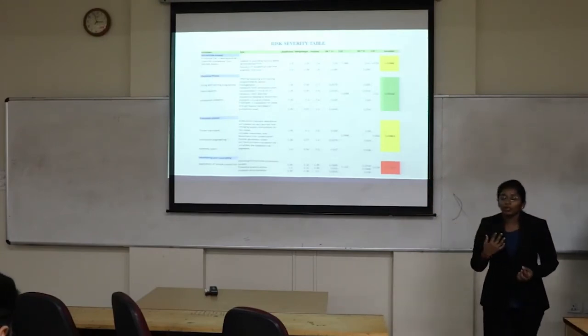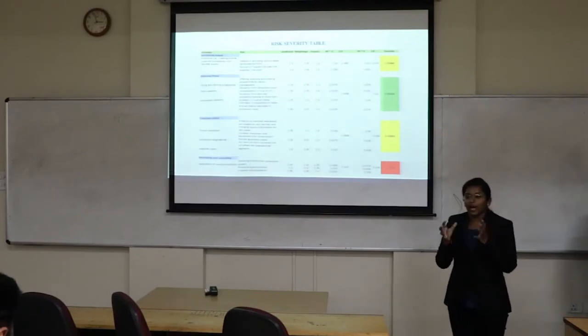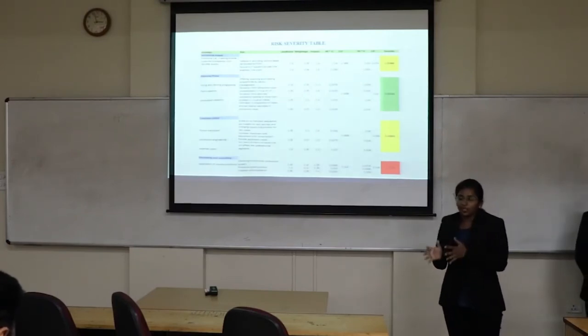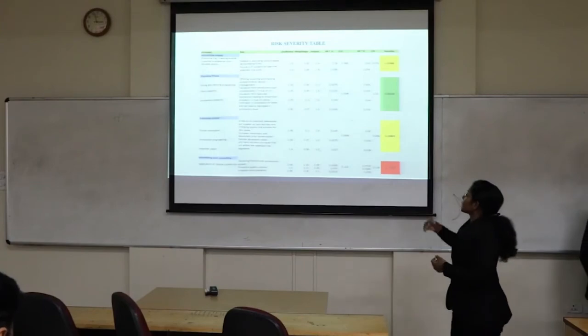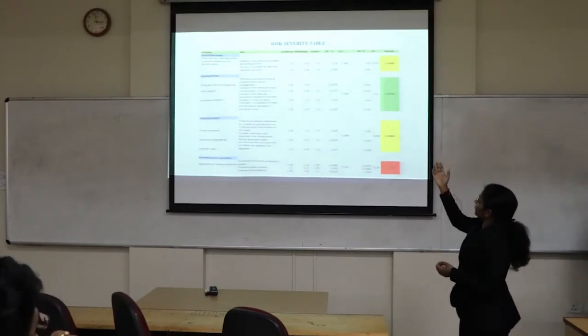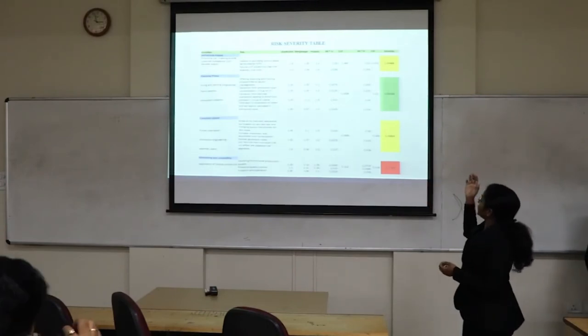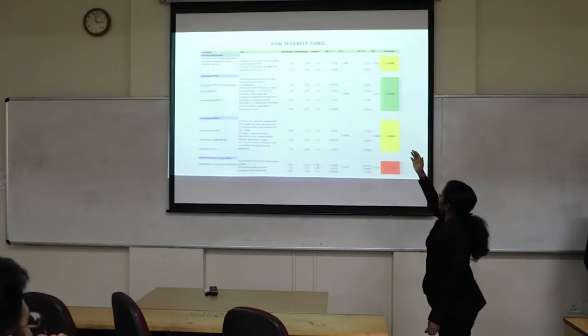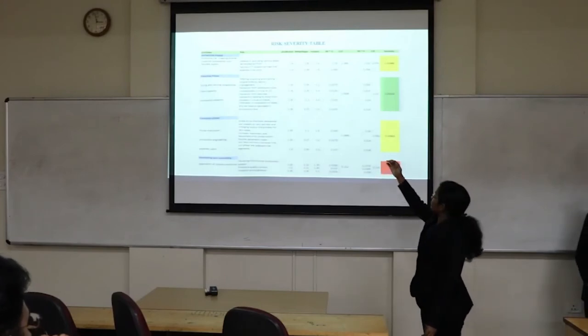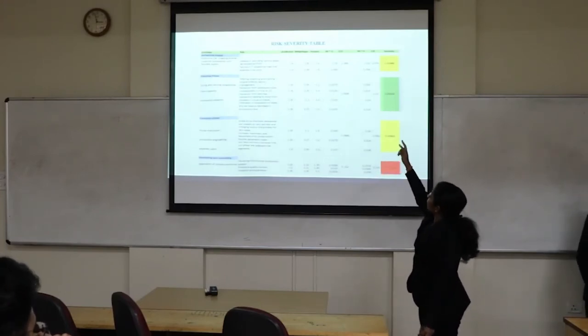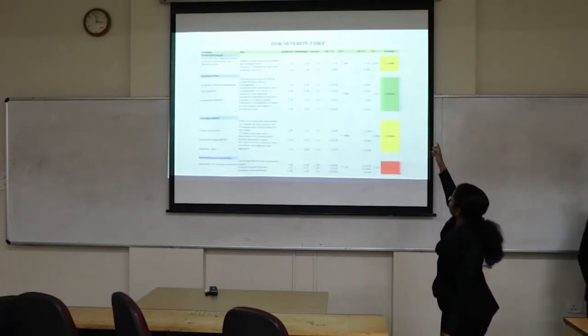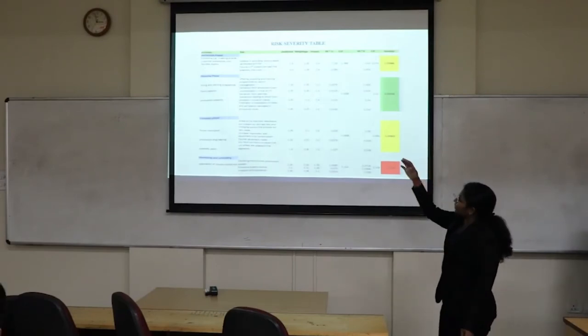It means how severe it will be if the risk for an activity occurs. For calculating CLF I have multiplied weightage into likelihood and for calculating CIF I have multiplied impact into weightage. We will be getting the values. I have added values according to the phase. In the initiation phase there are two risks. I have added that and found out the severity and in the same way I have calculated for each phase.